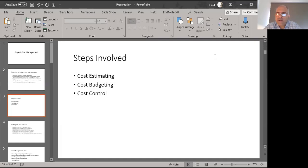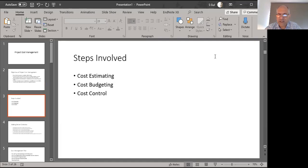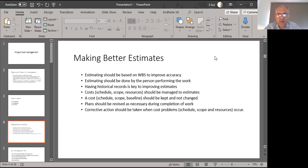The different steps involved in project cost management include: first, estimating the cost; second, creating the budget; and third, cost control. The primary objective is to come up with estimates of the cost of activities, materials, and other resources, combine them to formulate the budget, and then during execution compare actual against plan. Wherever deviations are found, cost control mechanisms are put in place to make sure we don't overspend.